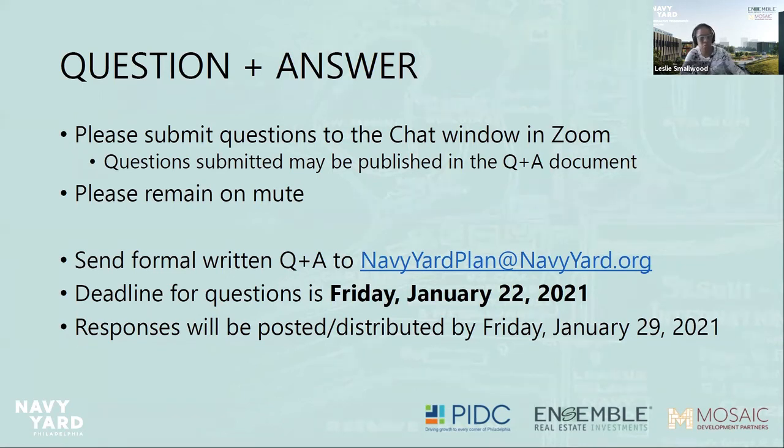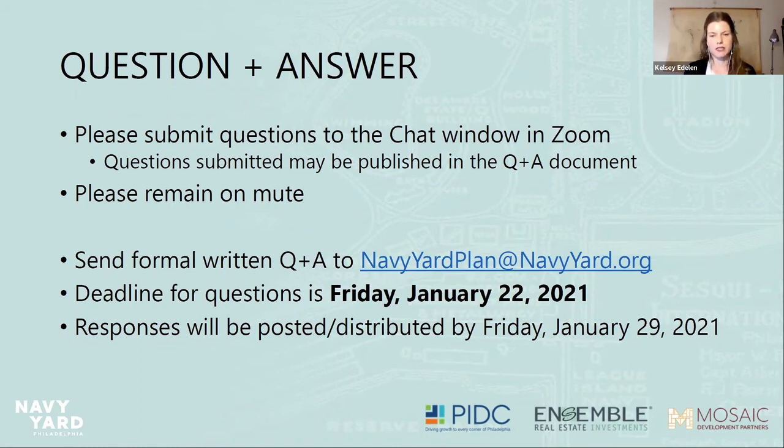And I can speak really quickly to, as Leslie mentioned, the historic preservation and our relationship. So the State Historic Preservation Office does have, as noted in appendices to the RFP, review and in some cases approval or comment responsibilities over different areas of the Navy Yard. There's a zone one and a zone two distinction. The buildings 83 and 624 that Leslie mentioned, the SHPO, as it's known, does have comment over those two.